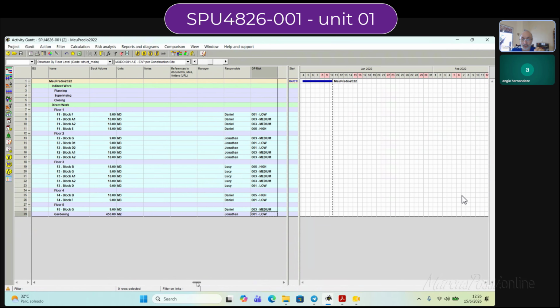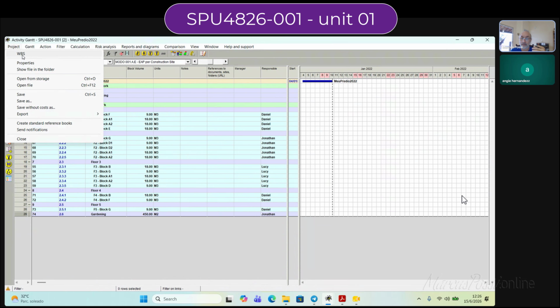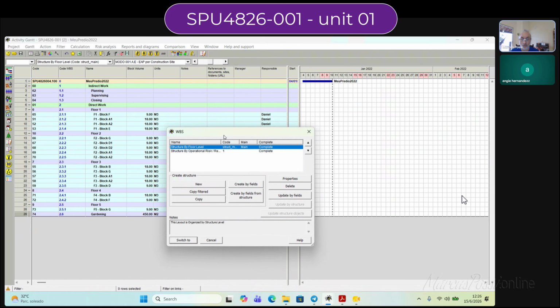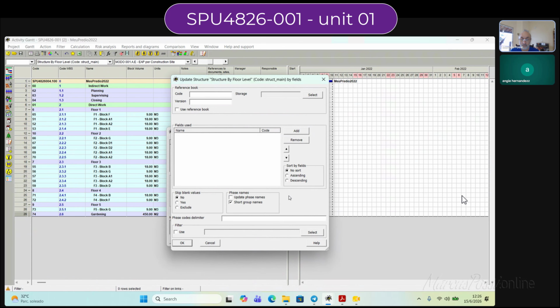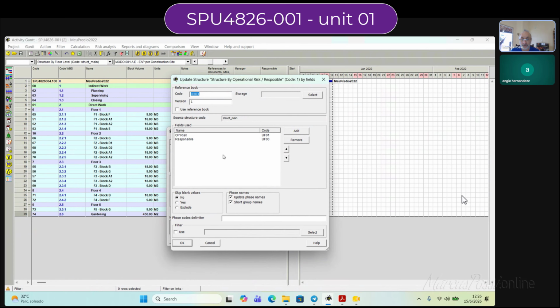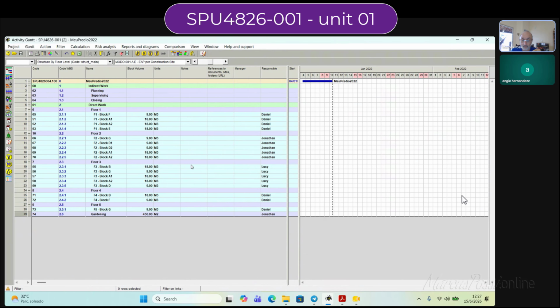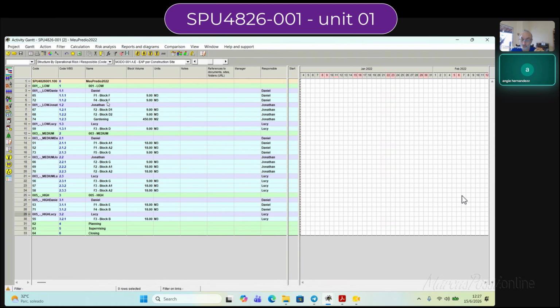As you made any change, you have to go to project WBS and re-update. Go to update by fields for risk structure. Okay, just press OK in order to recalculate, reclassify. Okay, look again. Is gardening included?